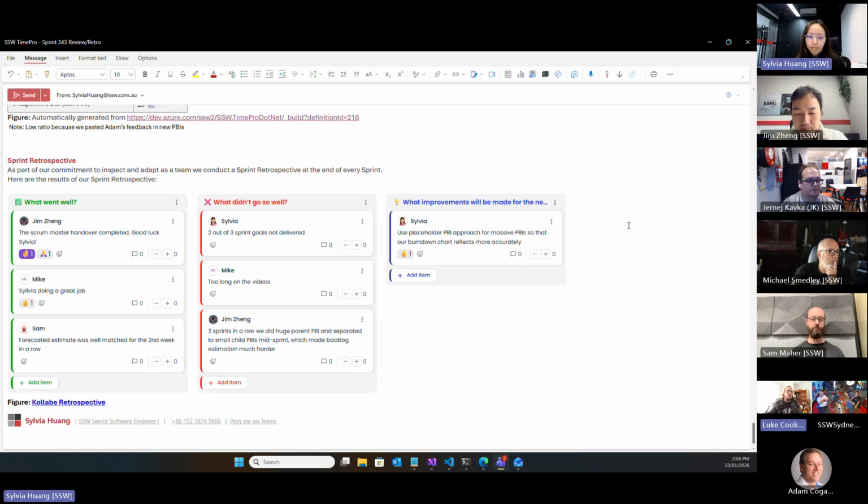Yeah. So what they've been doing is just throwing in one giant PBI, going, this probably covers most, if not all, of the effort we would need, but it is a bit of a finger in the air thing. So I don't really see any better solution to that, because I don't want to take more time away from the sprint to do a backlog refinement session, given that we're doing weekly sprints already. If we wanted to do backlog refinement, we'd probably want to look at making them two-week sprints or something along those lines, but we're just making do with the best we can right now.